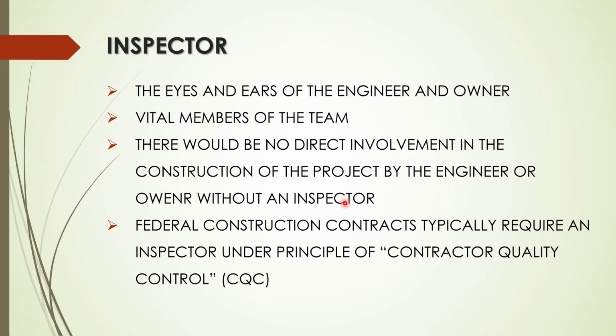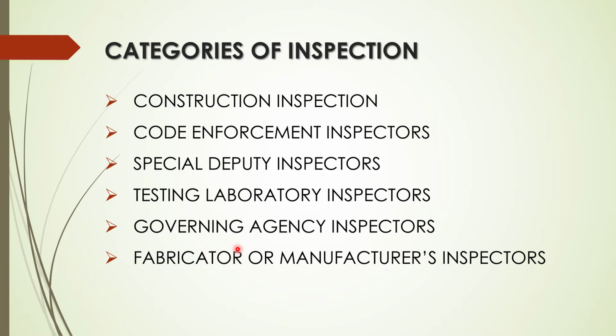Federal construction contracts typically require an inspector under the Principles of Contractor Quality Control, CQC. Categories of inspection: construction inspection, code enforcement inspectors, special duty inspectors, testing laboratory inspectors, governing agency inspectors, and fabricator or manufacturer inspectors. So construction, you're inspecting the construction.